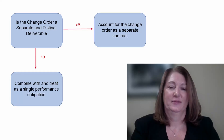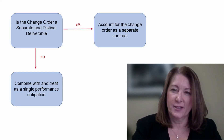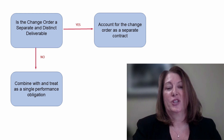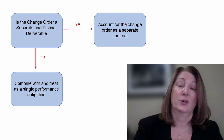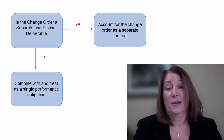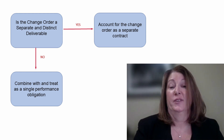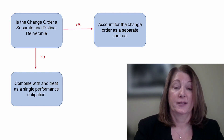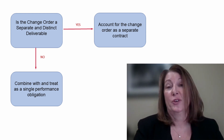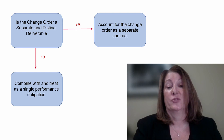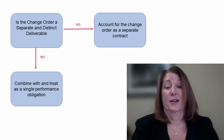We're going to start with the first question you're going to need to answer: Do I need to account for this change order as a separate contract? The answer depends on whether the change order is a separate and distinct deliverable. Not only does it need to be able to be delivered separately, but the customer must derive benefit independent of your base contract. If both conditions are met, you will account for the change order as a separate contract.